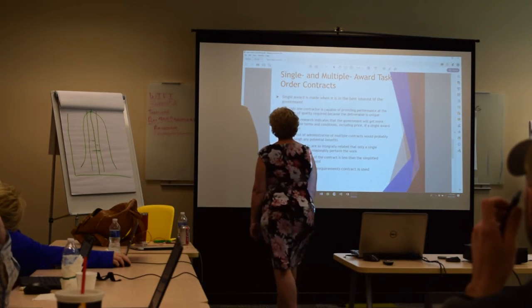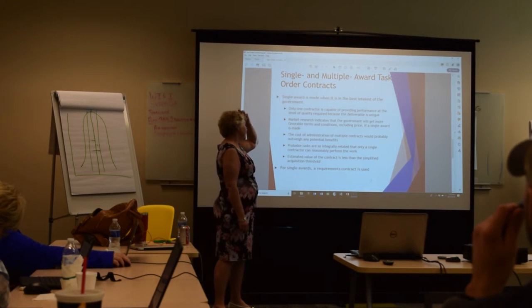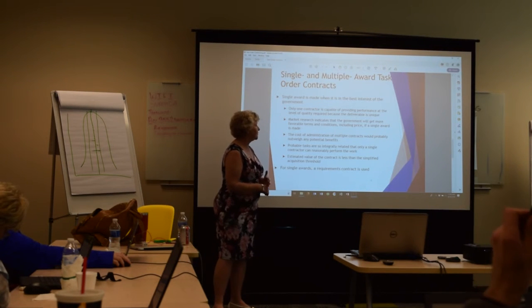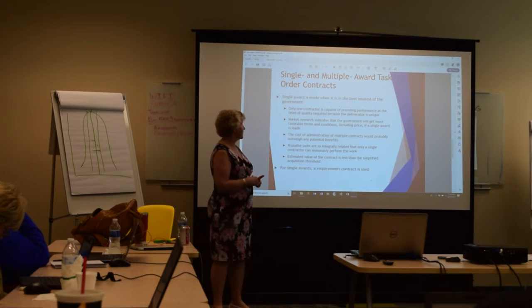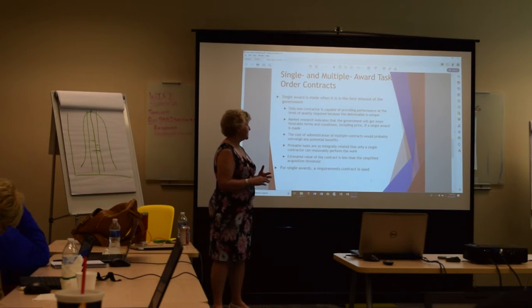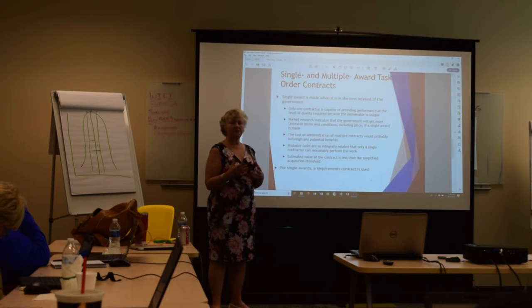Single award is made when it's in the best interest of the government. Under these scenarios, if there's only one contractor who's capable of providing performance and the level of quality required, they can go with just one company. Or if market research indicates the government will get more favorable terms and conditions if they buy all from one company. So keep this in mind.